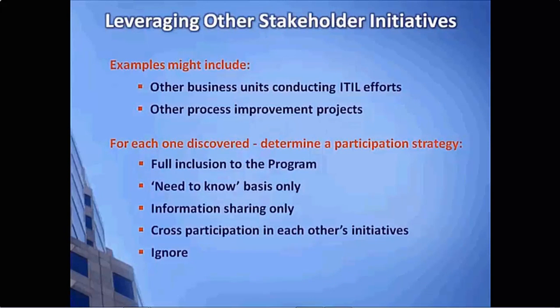They might be a full inclusion to the program, so you're joined at the hip in terms of how you work together. Maybe you decide you just want to know what they're doing and you'll share information only across the board. Or you may serve on each other's teams as representatives. Or you may decide that initiative just really doesn't matter and you should ignore it. But at least bring them into your team and you know where everything sits right at the start.